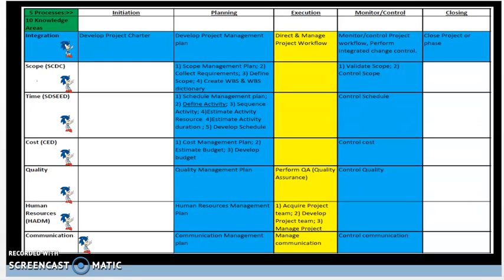On the other hand, gold plating is internally driven by the project team, such as software engineers, analysts, program managers, and other relevant stakeholders who would add nice-to-have features on top of the mandatory requirements, resulting in a situation where the team bites off more than it can chew or deliver for the project. The key point here is that the scope must be crystal clear with no ambiguity from the get-go, otherwise a lot of impediments will pop up during the execution phase of the project.